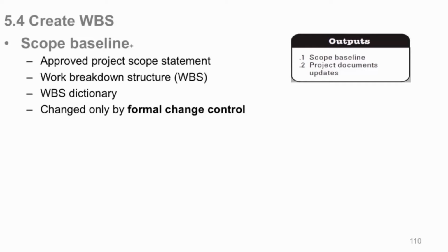So if your project is large enough or complex enough or long enough in duration to use rolling wave planning, where you know for sure that you have detailed stuff here, you're good, but 2, 3, 4 months out, it's kind of nebulous, but you've kind of planned an aggregate for it, because you'll need to do that for your project funding requirements that we'll see when we talk about cost management. You need to know in advance how much money you're going to need out of your authorized budget to be available at that time to pay for things. You need to make a good swag at it then, and you refine it later to be more exact.